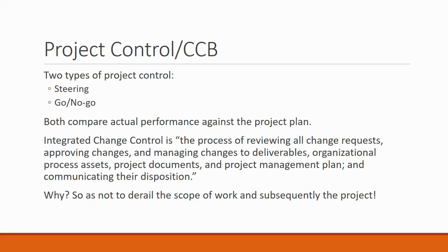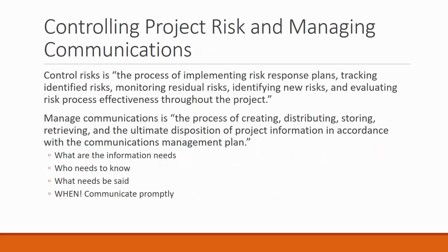When we are adding a bunch of scope to the project, we're adding schedule time, we're adding budget cost, and without properly reviewing and approving these changes, without getting more schedule or budget, we can quickly cause our project to be really in trouble, and then we have to report back, and boy, that's a bad thing.